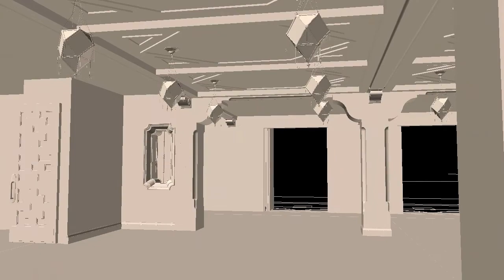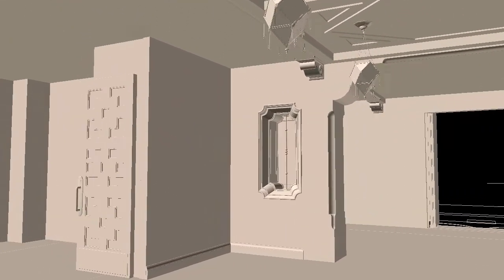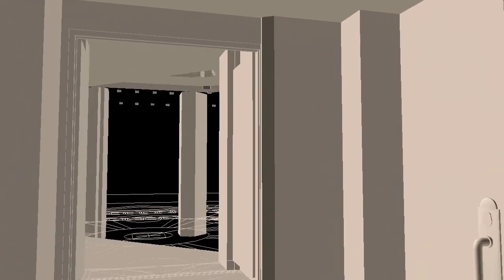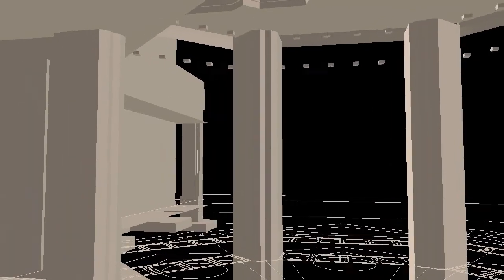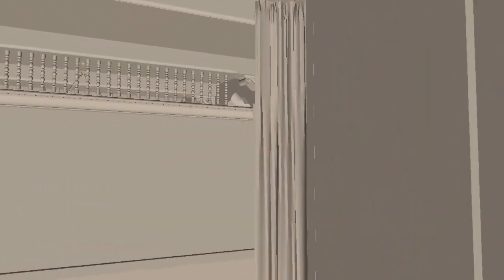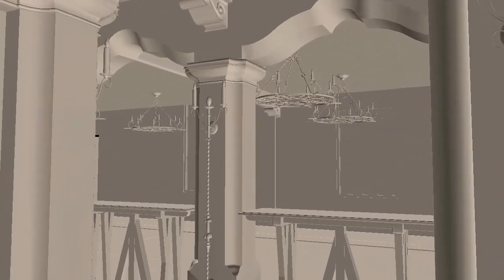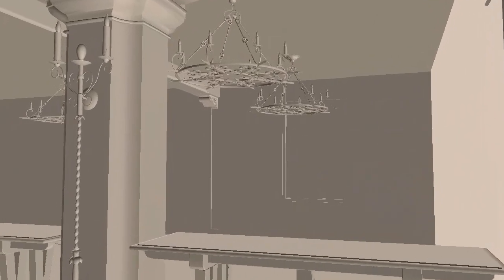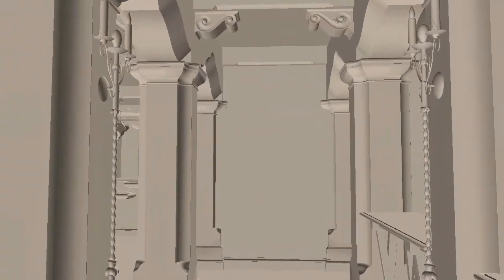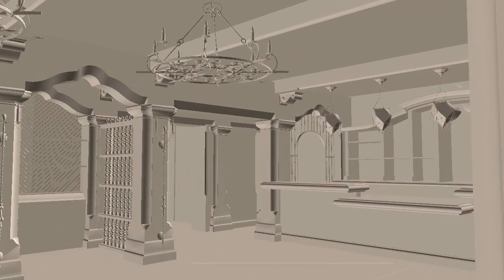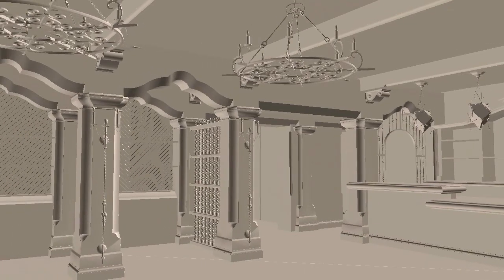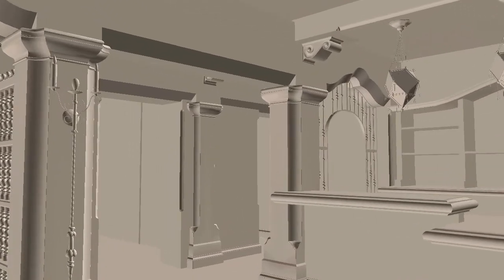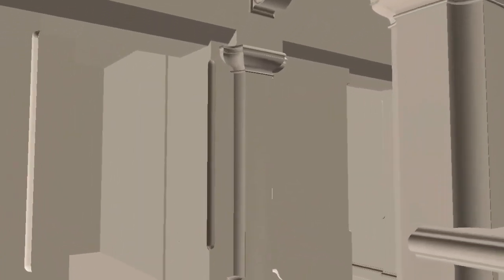Working with a client with a computer animation studio that's as successful as Pixar did present some challenges. One of the requests of the client was that we take this model and make it in such a way that it can be used in their virtual reality room for a virtual experience. We actually played this video in that room walking through the model for a number of their executives and others. This is why the model has such a high level of detail. This model actually came from the interior designer who put it together. Due to this project's timeline and the amount of design changes that were happening, it was paramount to have the shop drawings attached to the 3D model as they are in Revit, because doing it in the old way with a 2D drawing that then we manually convert to a 3D model would have been cost prohibitive in this case.